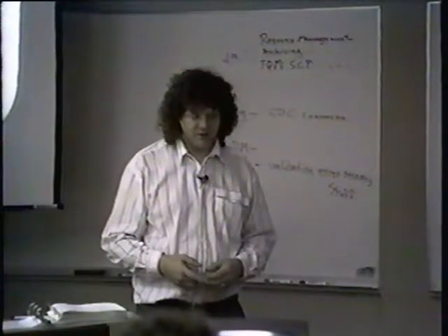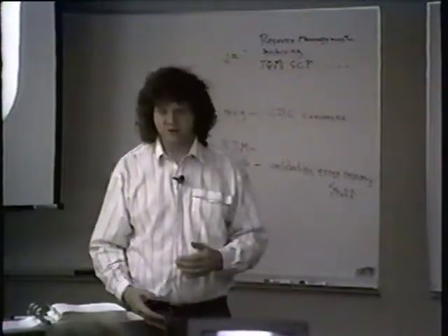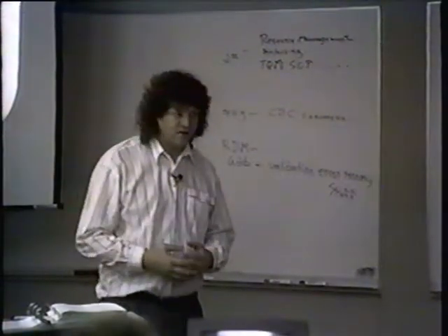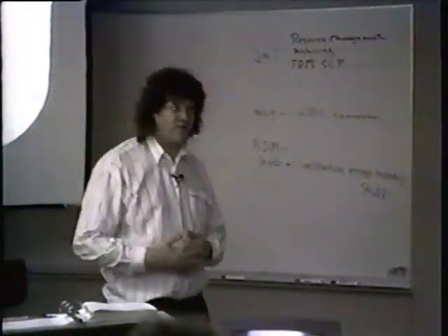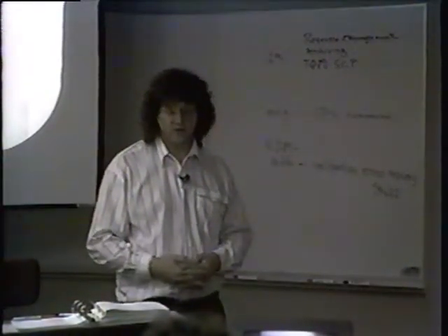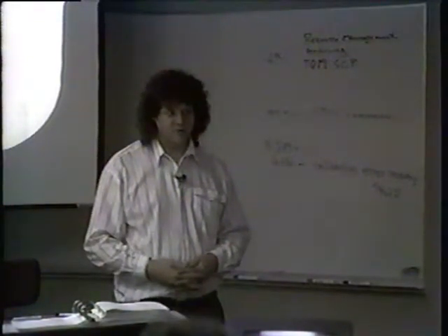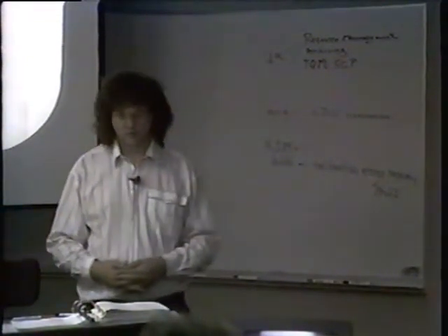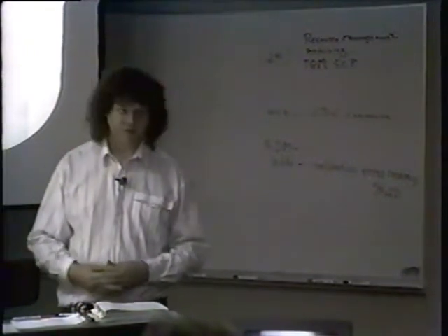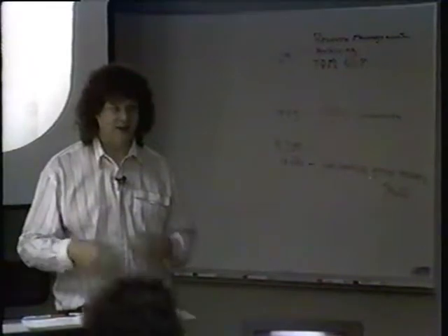Non-contractual agreements to deal with: an application acceptance list. Having up front, when this migration team is talking, a list of the codes that we're going to have to deal with. Now that may not be the only list. There may be additional applications, but at some point you don't want applications popping out of nowhere 5 or 6 at a time that you're going to have to deal with. You realistically want to know what codes you expect to have running on UNICOS before you drop COS service.